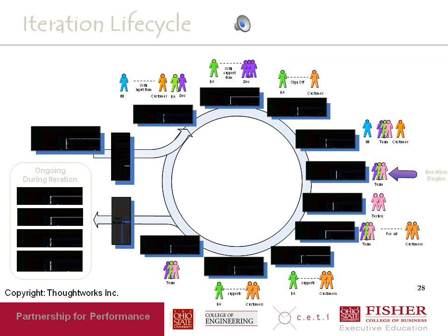And this slide captures how an iteration life cycle takes place. So the stories for that release have been identified as part of the release planning. Out of those stories, you pick the ones that you're planning to do in this particular iteration. You break down the stories further so that they are down to a granularity where somebody taking a look at them can say, yes, I think I know how to implement this. You expand the narratives on the story so that all the details are filled in.